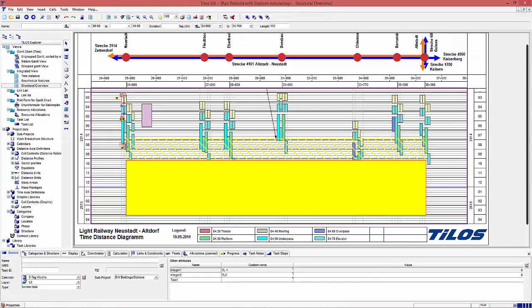During reschedule, the coordinates of the category or summary task get recalculated. Based on their hierarchy level, the summaries get the smallest and biggest coordinates of the content tasks. What does that mean for the specific summary? It will take location and time from those 3 tasks.